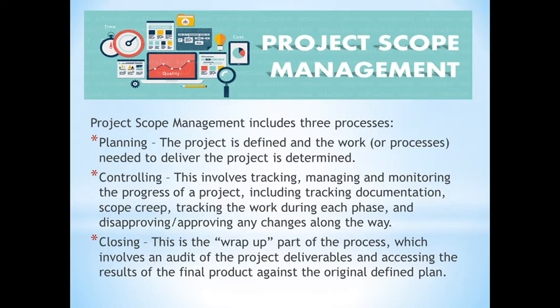Controlling involves tracking, managing, and monitoring the progress of the project — including tracking documentation, scope creep, and the work during each phase — and approving or disapproving any changes along the way. Controlling is the most critical process because change is inevitable. The last process is closing, which is the wrap-up involving an audit of project deliverables and assessing the results of the final product against the original defined plan.